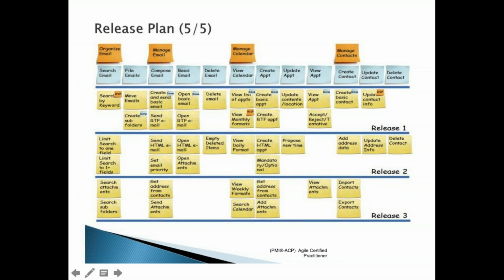So just to reiterate what we have gone through, the first step is to prepare the release plan, and after that we have to describe the main target output, what you are trying to achieve. Then break those down into major tasks. Then take the details of those tasks and make them into releases. Then schedule the sprint. So you have a theme level you will divide, and then at an epic level you will divide. Then the user story level. You will take this user story and break it down into tasks at a sprint level, right?